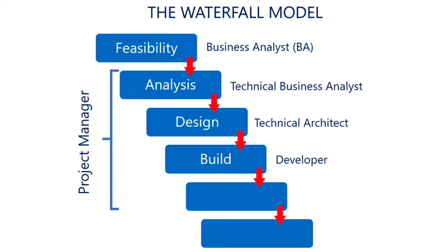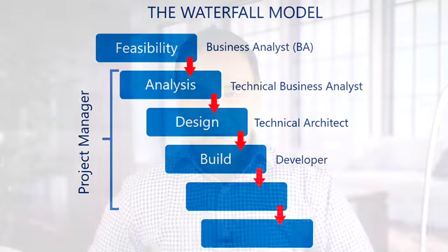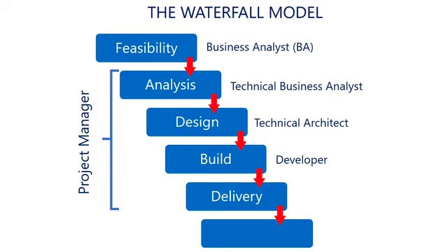Now, if it's an application, the technical architect will pass their technical specification over to the developers, and the developers, as we've understood from an earlier session, can be split into front-end, back-end, database, and full-stack developers. And they will look at the technical spec, and everyone will know exactly what they're about to do. So you can see it's a lovely logical flow as you go down the waterfall model. The developers get everything ready for you and me, the user. But of course, just before we use it and deploy it into the user base, we need to test it. Enter the software testers.